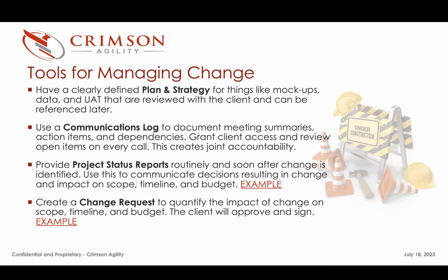To Adam's point, we need to make sure we're not underestimating anything. And if you are buffering your estimates, make sure the developers know that. Make sure that, hey, you estimated this at 3 hours. I put it as 5. I expect you to finish it in 3, but I just want to ensure that we get this right, because the client's going to fight us for every additional hour that we need.